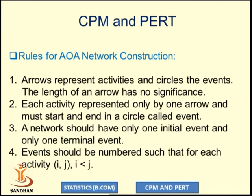Now, how to draw the AOA network diagram. There are some rules we have to keep in mind. Arrows represent the activities and circles represent events. The length of an arrow has no significance. Each activity is represented by only one arrow and must start and end in a circle called an event.